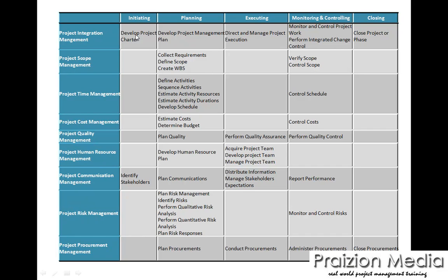Because the moment the project charter is developed, you move into having your kickoff meeting to discuss with stakeholders that you have identified how you will begin to plan the project. So this is a very important step. You absolutely need to identify these people. You need to keep them on radar right from the beginning and all through the project.